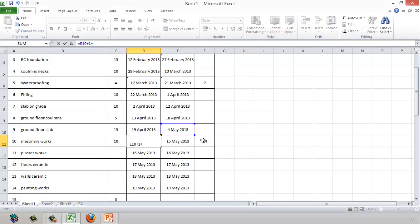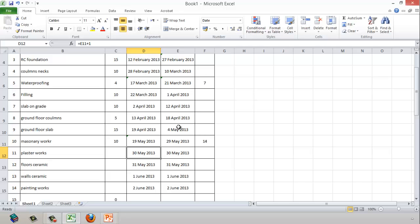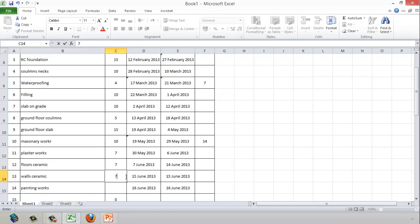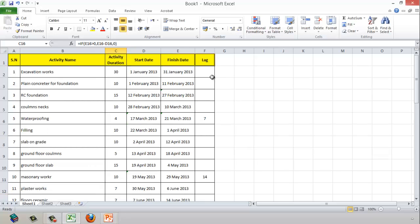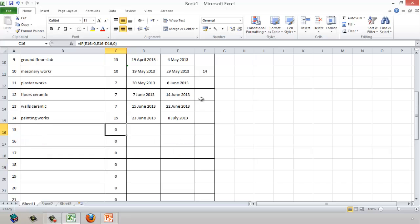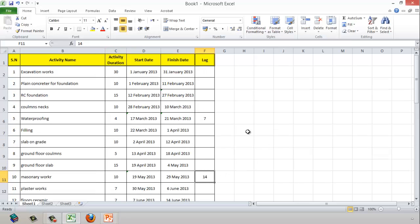So even though I finished on 4th May, I cannot start masonry work on that same date — I have to wait 14 days of lag. We then continue: plaster work 7 days, floor ceramic tiles 7 days, wall ceramic tiles 7 days, painting work 15 days. I've now created a complete activity list using Excel formulas for start, finish, and lag.